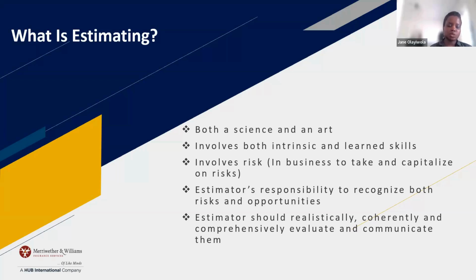So some of those risks might include unclear scope of work, right? Some other risks can include uncoordinated drawings or conflicting drawings. Maybe the architectural sheets say something different, but then when you get to the civil plans, they say something completely different as well, right? So if they're uncoordinated, that's a conflict and that's a risk because you don't know which is correct, right?